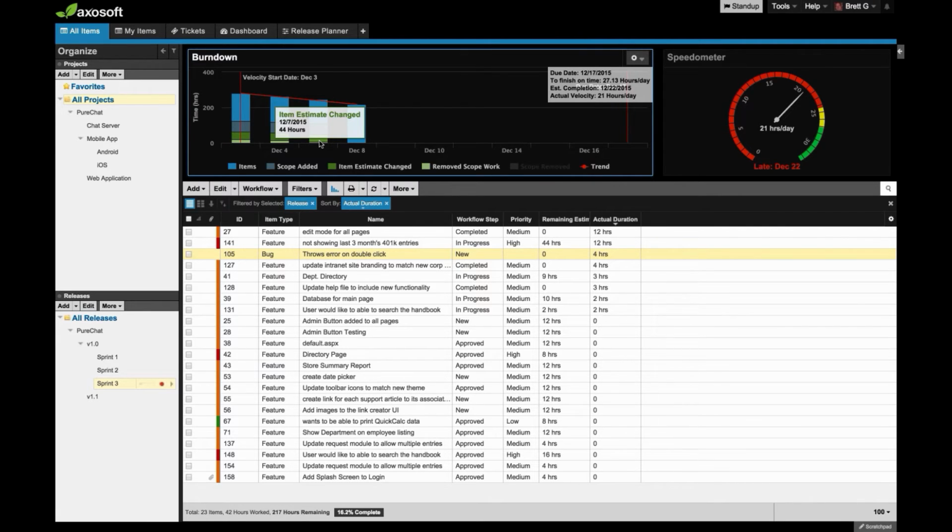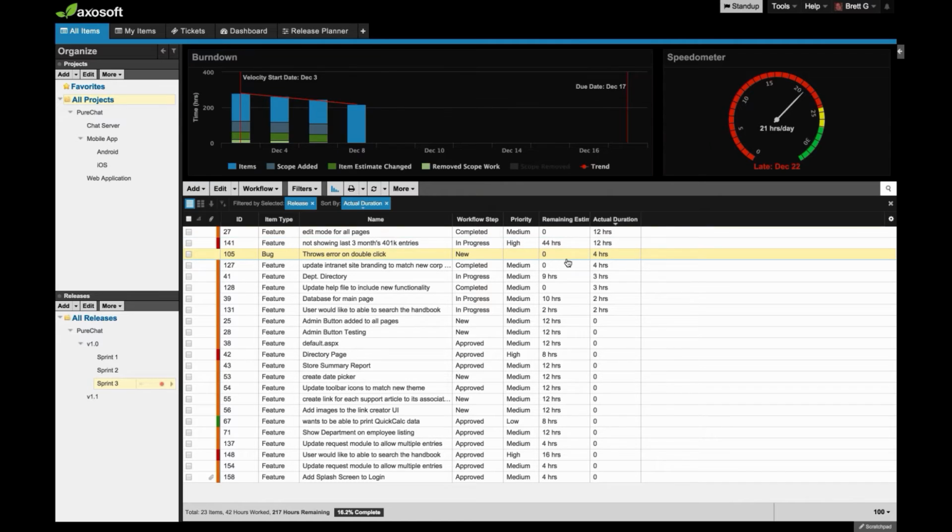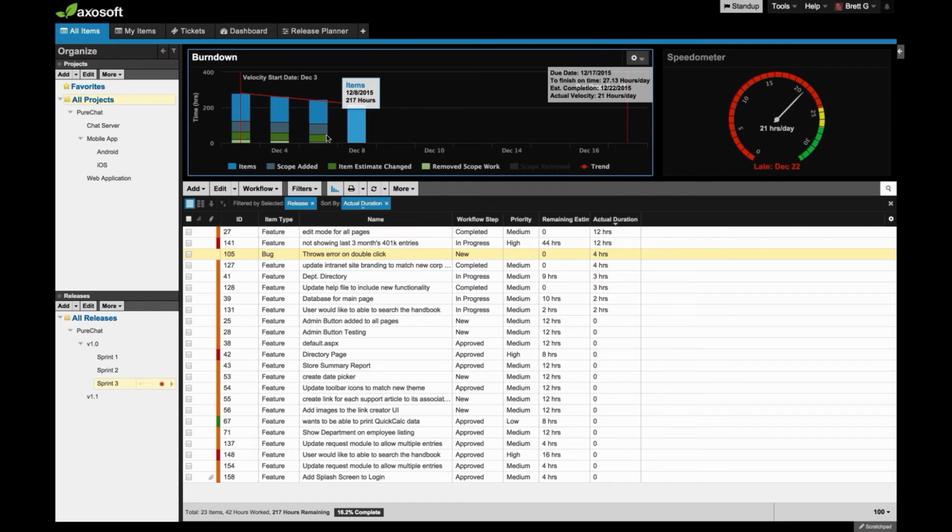Because basically, whenever you add a work log, if the remaining time on that item is 0, like I didn't even estimate that item, I just said, okay, there were 0 hours there, what it does is actually add that to the item estimate changing there.